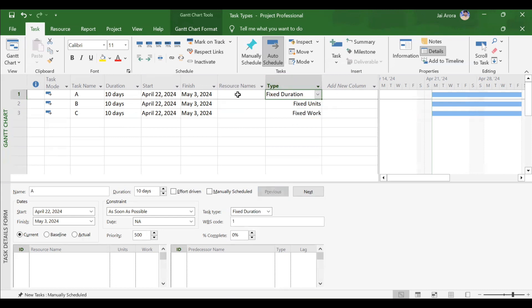Duration is very simple. For example, activity A is 10 days, and the calendar used is a standard calendar of 8 hours per day, Monday to Friday. So 10 multiplied by 8 gives 80 hours. Duration is nothing but the span or length of the activity in terms of days or hours.